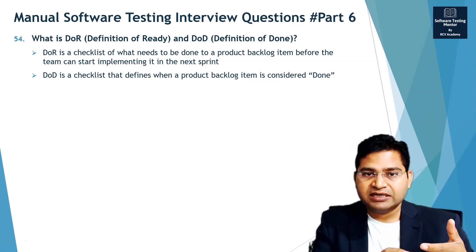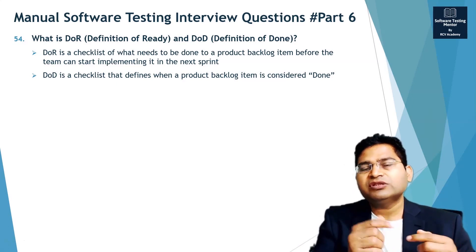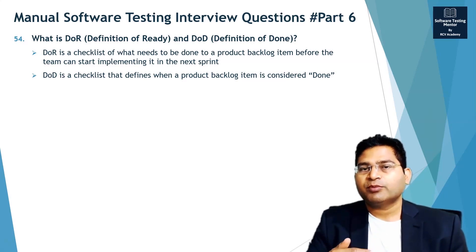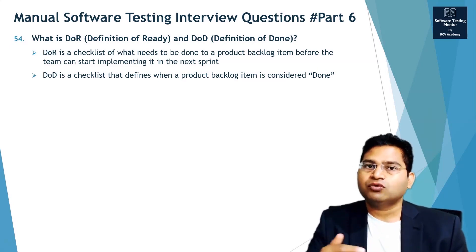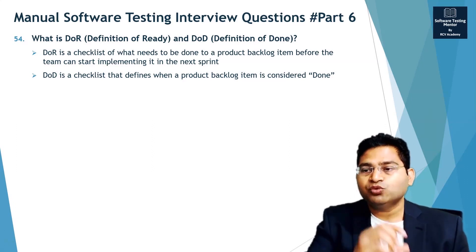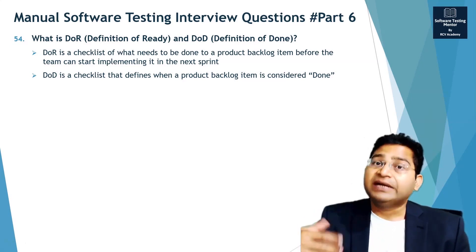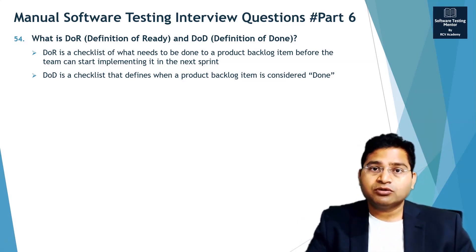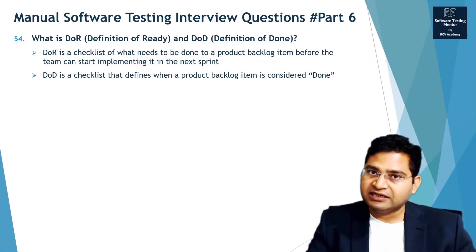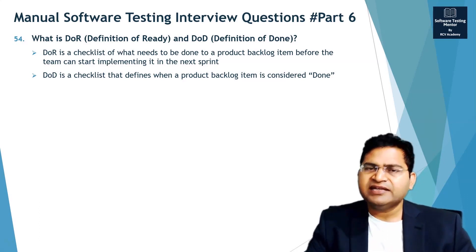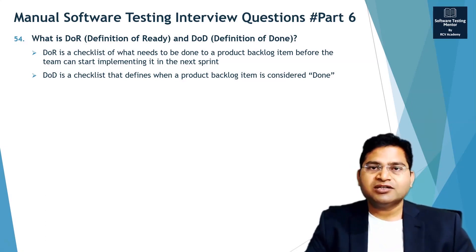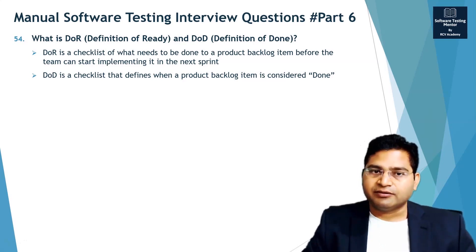User stories should have clear-cut requirements and defined acceptance criteria with no ambiguity. These are checklist items defined for a product backlog item to be called 'ready,' so the team can pick it up and start building without encountering ambiguities. When they read the story, they should clearly understand what needs to be implemented. All acceptance criteria, details, and outstanding questions must be completed and documented in the user story so it is absolutely ready to be built.